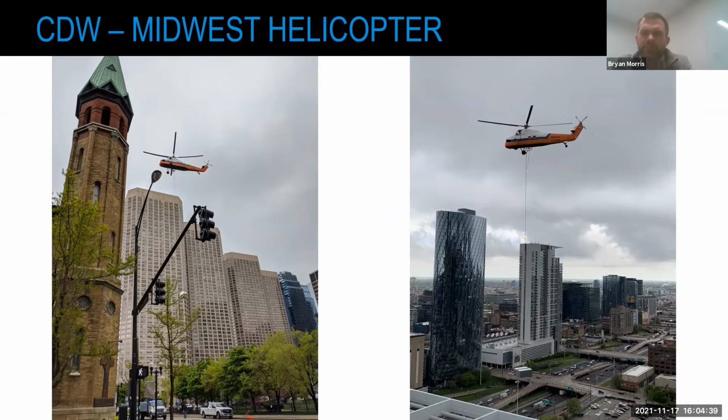You want to have a good day where you want to set it, and then you have to have an alternate day as well that's cleared by the police department, the fire department, and the alderman of that district. So yeah, about 2 months in advance, we had to put this plan into place and notify the proper individuals to get the correct permits.